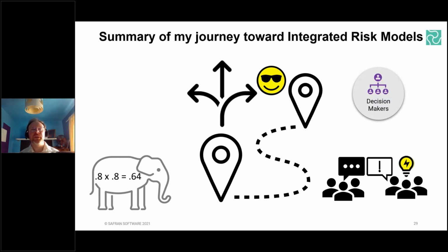And then fourth, just by ensuring that time is converted into cost and vice versa, you more readily produce decision grade insights for senior managers. For them to know that the feedback loops and the correlations are in place gives them greater confidence in understanding the trade-offs that you might be asking them to consider as part of the output of your model. So seeing how a milestone's JCL trends under various different scenarios, or then how that affects the cash flow of any given period, these are all unique outputs to a truly holistic and integrated risk model.